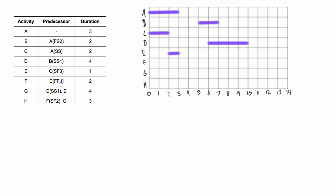Activity F depends on C, and it's a finish-finish relationship with a lag of three. So we find where C finishes - it finishes on day two. A finish-finish relationship with a lag of three means F can finish three days after C finishes. We count three days out - one, two, three - so that will be the finish point of F. But it has a duration of two, so it would have to start on day three if it's going to finish on day five.